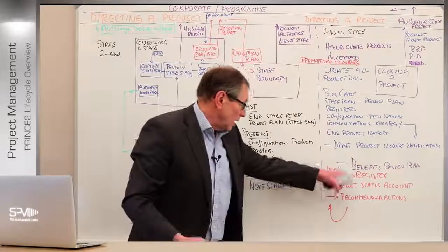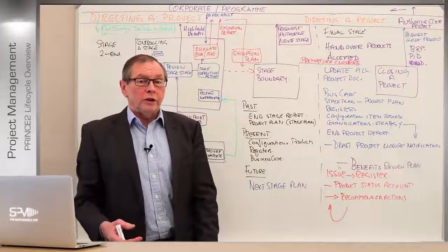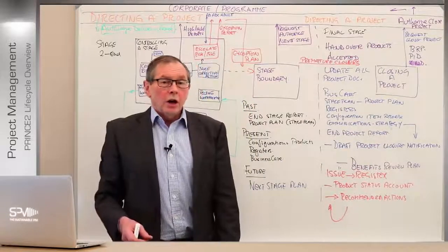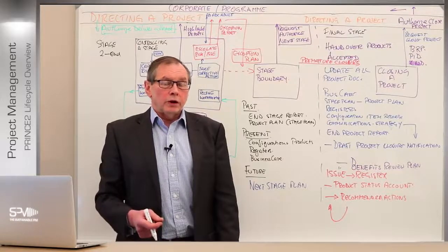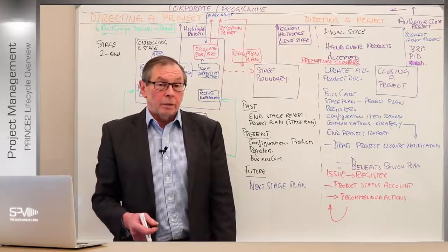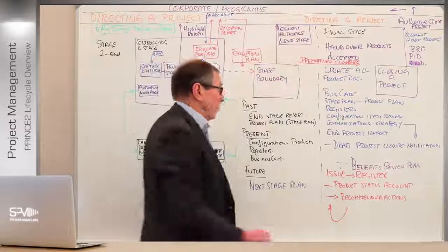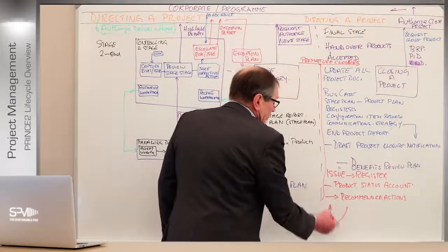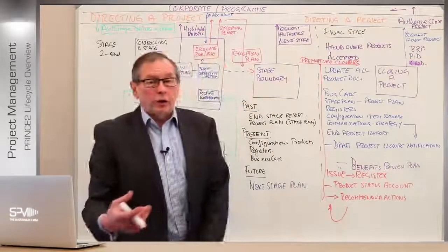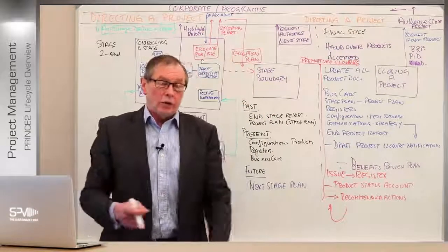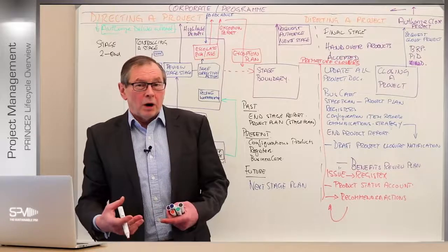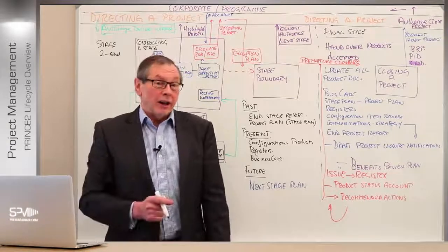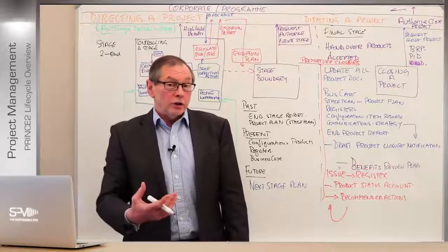But remember, do make sure you document it from an issue. And then we go through the rest of it to then go and authorise, or get requests to authorise, close the project from the board at this point. Right. So that premature close will come from anywhere. So that will link down to all this stuff here to do these, but you still have to go back and complete the rest of the documentation anyway, close it all off. Right. So just bear that in mind. But don't forget the issue thing, because you want to make sure you understood why you did that. But this is how we close the project down.